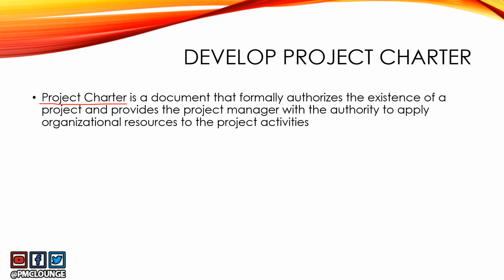The first thing that it does is it formally authorizes the existence of a project, and it provides the project manager with the authority to apply organizational resources to project activities. So if somebody was to come to you and challenge you on using any of the organizational resources, project charter is the document that you would show them, because that document has given you the authority to use the resources for your project.